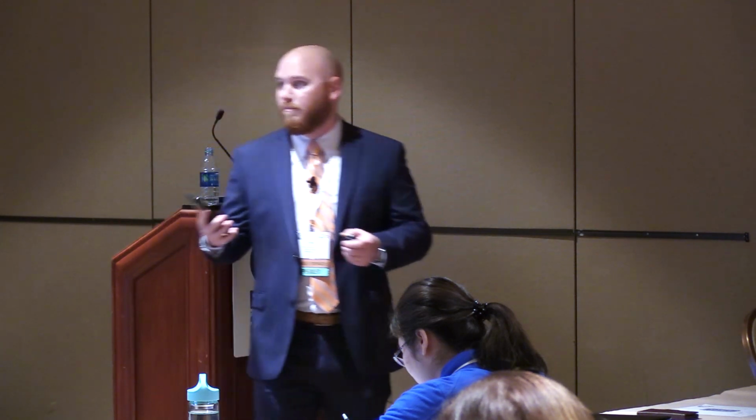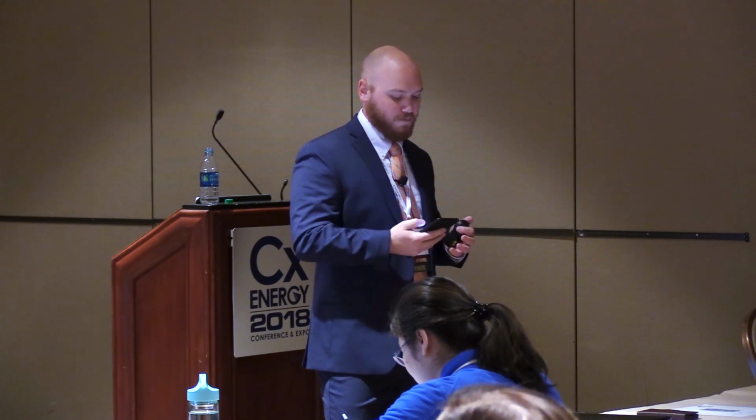So when you're working with such low tolerances, any kind of little dust particle in that flow ring can mess up that flow. And small changes make great sacrifices, I guess you would say. If you're 5% off on the low side and 5% high on the high side, you're talking a 10% swing there, and that affects your air change rates, it affects your building pressure or your room pressurization. All that is affected. So you also have yearly fume hood calibrations that take place. They're looking at sash height position, making sure that we're obtaining that 100 feet per minute face velocity that we want to get.